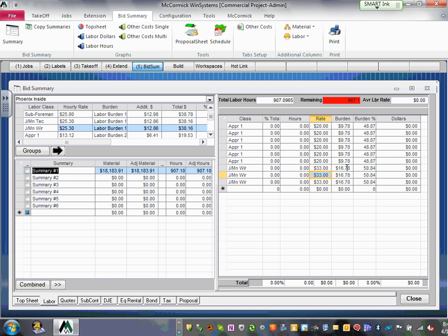Now I'm going to allocate. So now you put your labor. Here, guys, the percentage is very important, Adam. This percentage is you telling the software how much time this person is going to be allocated to the job. So I have 9 of them. Here's my assumption, and you're a project manager, you assume anything you want. I'm going to assume that those 9 guys are sitting on the job doing all of it at the same time, so I'm going to divide 100% by 9, right? That'll get you 11 something.